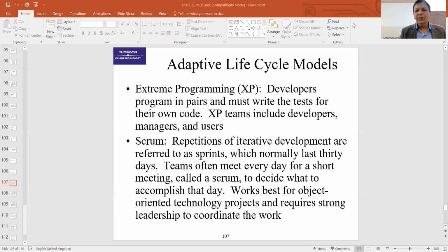Then we have the sprint planning meeting, because of which the team will select 1 or 2 or 3 stories to develop in the first sprint, so that we have the sprint backlog. Then we have the sprint, and then the shippable product, and the sprint review, and sprint retrospective. That is the flow diagram of the Scrum methodology.